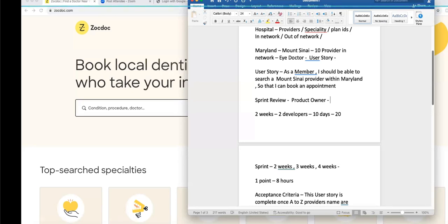And then we go to the backlog, we take every user story, and you're going to give your effort, like how much it is going to take, whether it's a one-pointer from your perspective as a BA, how long it will take to test this particular user story, and the developer has to give from their perspective. We are not interfering here. We cannot say, no, complete this in 8 hours. We cannot say that to them.